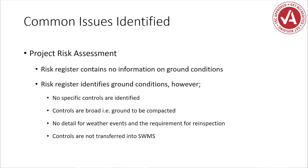Common issues identified when out on site: the project risk assessment doesn't even contain any information on ground conditions. From a starting point, it should at least identify them. Or we find the risk register identifies ground conditions but has no specific controls identified. Or controls are very broad — it might mention ground to be compacted or inspected, but there's no specificity about how that is to occur. And then there's no detail on weather events or requirements for re-inspection. Some crane pads are in place for a significant amount of time and do get affected by weather, so there should be detail about the frequency of re-inspection.